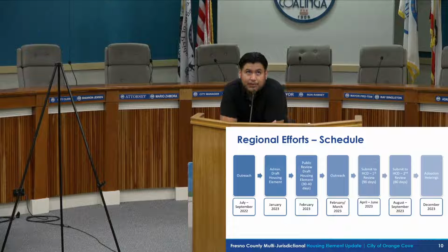After that, we have the public review of the housing element, which typically takes around 30 to 40 days, and that's scheduled to be completed in February 2023. And then after the public review is completed, we have a second round of outreach where we do another round of workshops and webinars for the community and get more feedback from key stakeholders in the region.